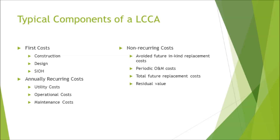Typical components of a Life Cycle Cost Analysis include first costs — construction, design, overhead, and project management — and annually recurring costs such as utility, operational, and maintenance costs. A very important category is non-recurring costs: they may recur, but not annually. These include periodic O&M costs, total future replacement costs, or residual value at the end of your LCCA period. We'll discuss how these are particularly important within an ECIP 1391 submission.